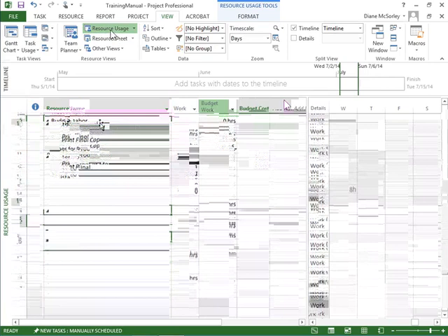So for the budget, for labor, let's say we've got 650 hours. For material, that's our paper, maybe it's 6 reams. And maybe for our budget miscellaneous, maybe 1750. So we enter in these values, and again, what will happen is now when we run our reports, we've got our overall budget in project.